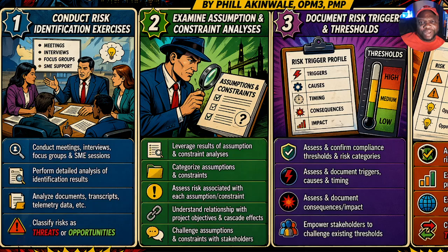When you identify risk, we have what we call secondary risks. A secondary risk is a risk that happens as a result of you trying to prevent another risk. So the cause, risk, effect model needs to help you think in a cascading way. What could cause that risk to happen? If that risk does happen, what is an offshoot risk that could materialize if we're trying to prevent that risk?